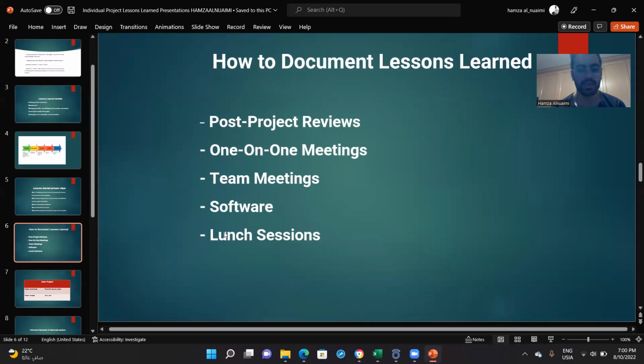One-on-one meetings: meet one-on-one with your team member and ask them about their lessons learned. You may discover that team members are more willing to offer feedback with this personalized meeting, and you may collect some valuable ideas. In a private conversation, people are less concerned about others hearing about their mistakes and faults in the project, and they will speak freely.